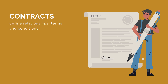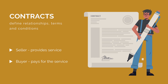Contracts define each of these agreements and exist between the different parties involved in a construction project. In any construction contract, there are two parties: a seller who is providing a service and a buyer who is paying for the service. The contract specifies the services the seller is providing — for example, a subcontractor agreeing to construct the foundations for a new bridge — the price the buyer will pay, such as the head contractor agreeing to pay $56,000 for these foundations, and the terms and conditions, such as the works must be completed in four weeks and the subcontractor has to provide concrete testing.